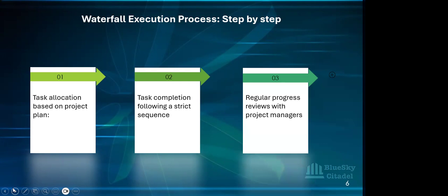And within the development, or the execution phase, sorry, of the project within Waterfall, you have regular progress reviews with project managers. So formal progress reviews are conducted at predetermined milestones. You might have it at the end of each phase, and then there will be a review of what has been done. Project managers will assess progress, address issues, and ensure that tasks are completed according to the project plan, and any deviations are evaluated for potential impacts.